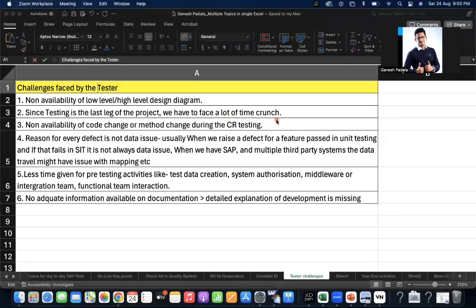Generally, they don't allocate proper time for regression testing and UAT; they give a certain amount of time only. But in a regular project, there would be overlapping, certain developments get delayed, or new requirements keep coming. During such frequent changes, the time allocated for testing may be reduced. Initially they planned for 4 weeks, but they might pressure or request to complete within 3 weeks.